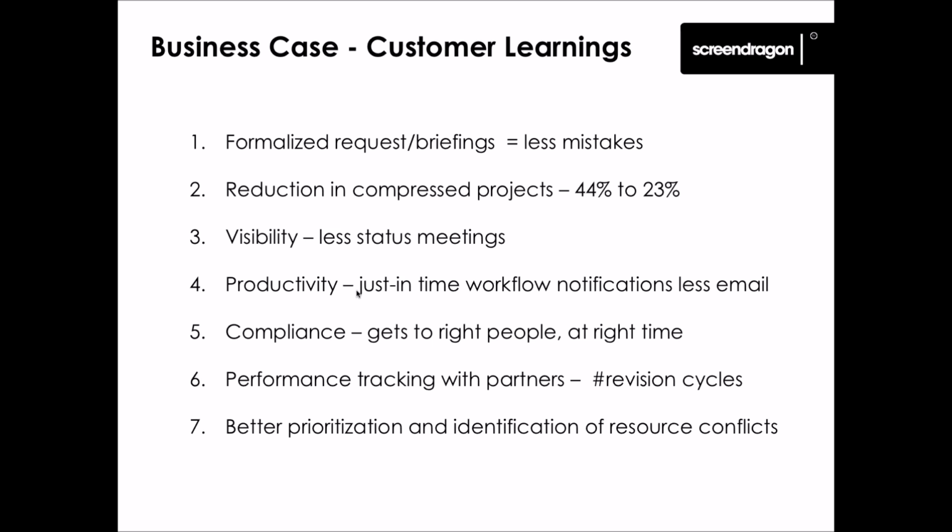The next one we've learned is that, again, by standardizing this and pre-informing the requester that this request is going to generate an impact on the organization, such as the compression here, and compression costs money, they often change their deadlines and timelines because they're notified upfront that this is going to put pressure on the organization. Therefore, have you an alternative route or approach to this project?